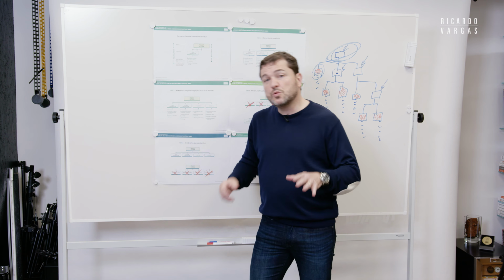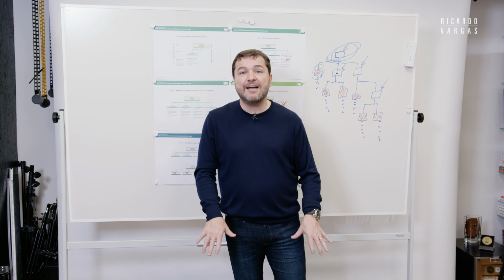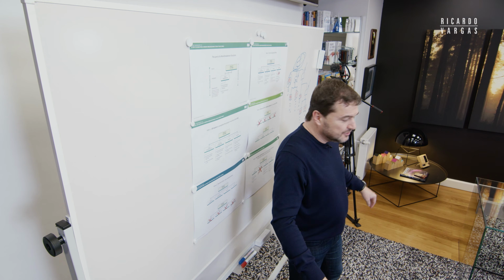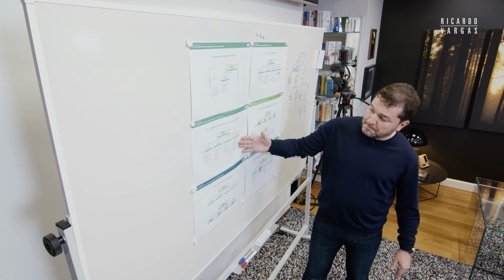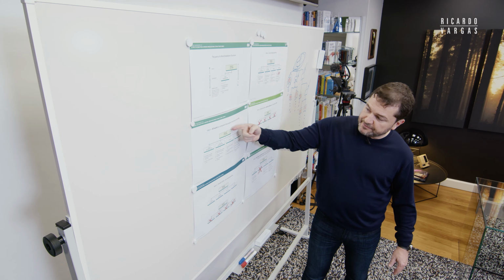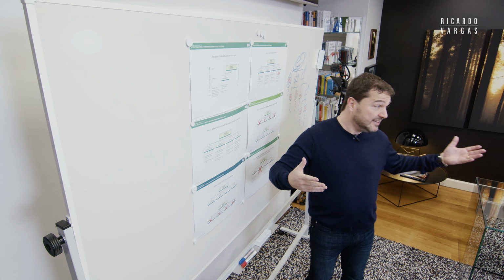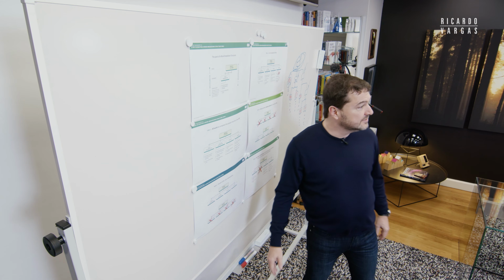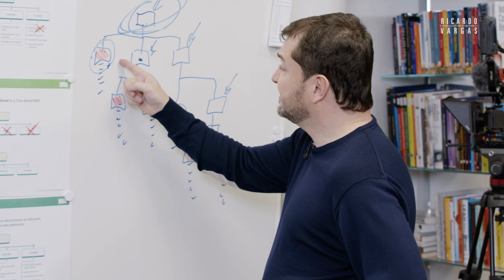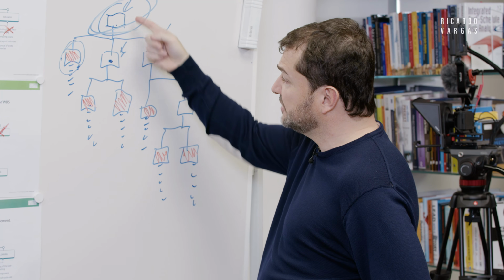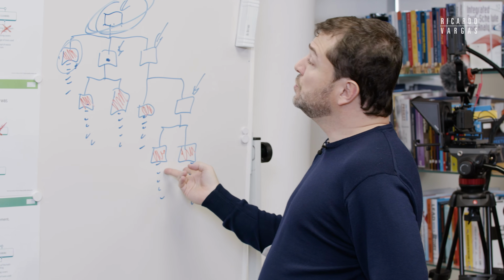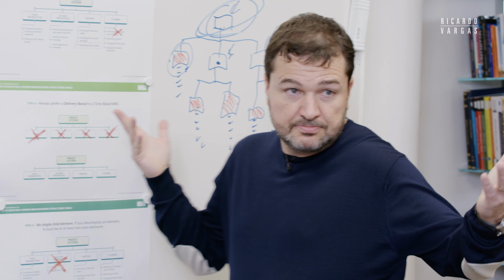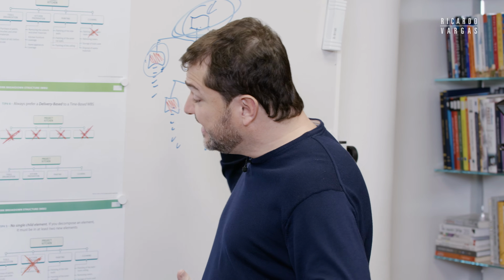So you don't need to go down to the same level on everything. Here, for example, all the work packages are on the 3rd level, 1st, 2nd, and 3rd. It's not always true. Here I have a work package on the 2nd level, imagine this is the 1st. On the 3rd, I have 2 and 3, and I have 2 on the 4th level. Okay, this is just an example.